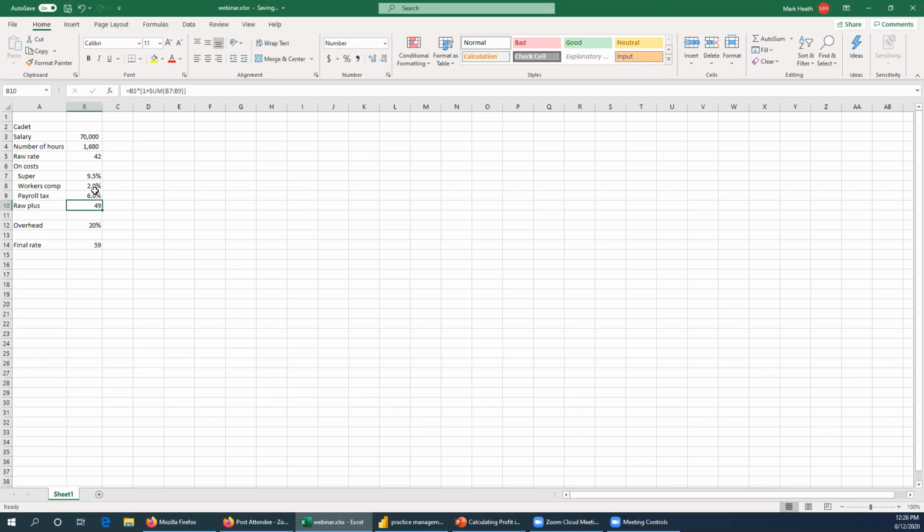And then you have a decision to make. And this is why I mentioned, are you measuring to gross margin or to net margin? Our opinion in this is you'd probably stop there, because allocating overhead to projects is something that a project manager on that project can't really control. If management has Rolls-Royce facilities and does a lot of marketing because they're trying to build sales, it's not really a project decision, it's a corporate decision. Overheads go up, their project gets hit with a higher cost, but they haven't really managed that. But that's up to you.